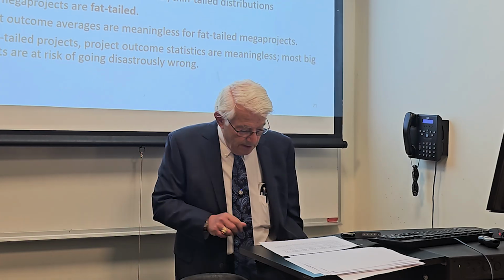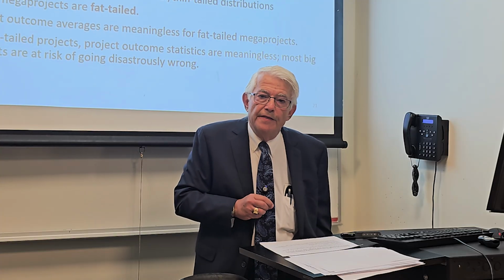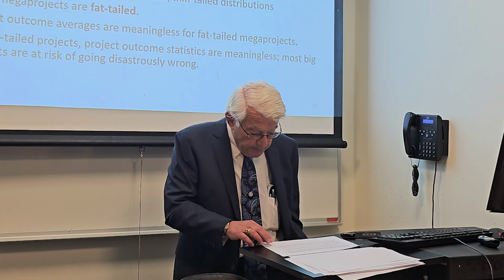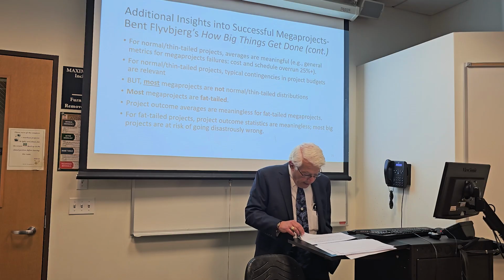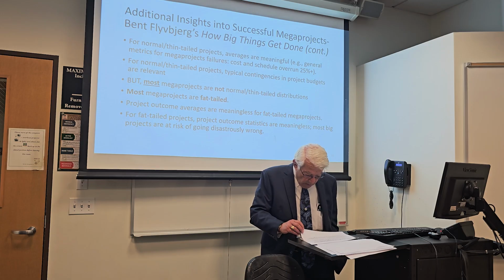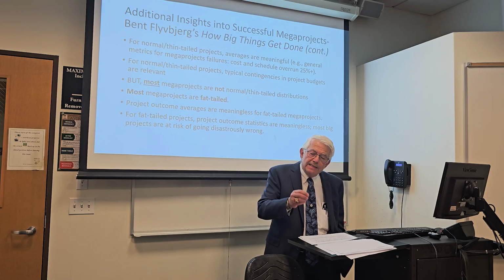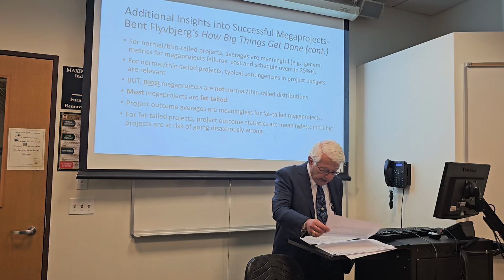However, the majority of mega projects are not thin-tailed, they're fat-tailed. So what does that mean? Project outcome averages are meaningless for fat-tailed mega projects, and for fat-tailed projects, project outcome statistics are meaningless. And what happens is fat-tailed mega projects, when they go wrong, they go disastrously wrong.